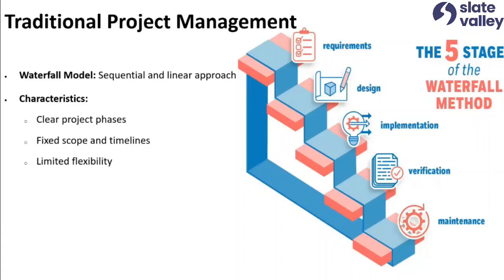And when you are doing implementation, in implementation also, you have the waterfall method inside a project, because unless you make your foundation ready, you can't do pillars. Unless your pillars are ready, you can't do a roof. Unless your roof is ready, you can't do painting or electrical work or sanitation work. So all these things, the project starts somewhere and ends very late.